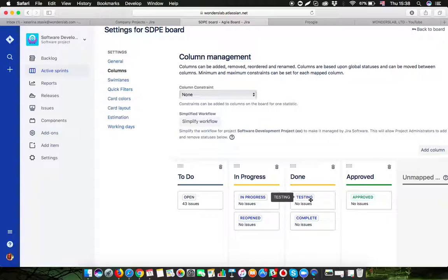When the tester believes the definition of done was not accomplished, was not implemented, they assign a status reopened. And then the development team, or the designer or a developer, they know they have to fix stuff. And when they fix stuff, they again assign a status of testing, for the user acceptance testing department to double check. And again, if everything is okay, they assign a complete status, and that is how a product owner knows they now can check if the vision was implemented, if there is a business value, etc. So this is how I recommend to use statuses within the columns.